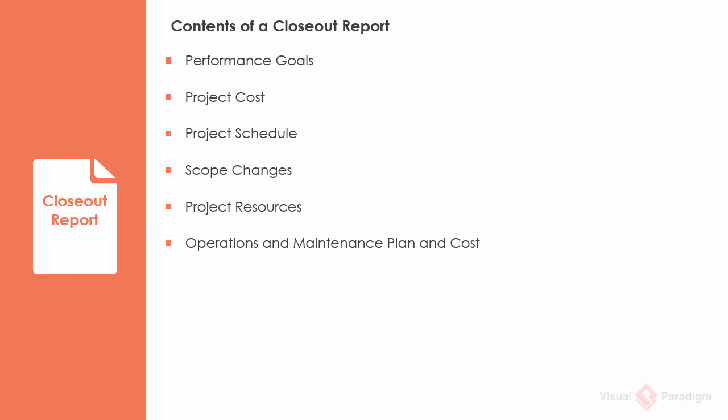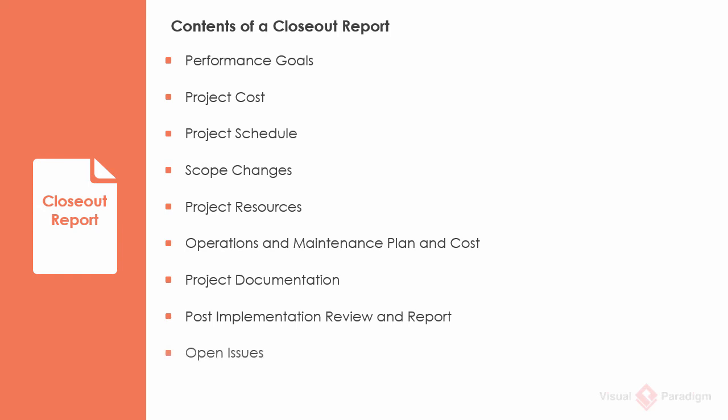Operations and maintenance plan and cost: the plan for operation and maintenance of project deliverables, stating the estimated annual cost of operations and maintenance. Project documentation: identify all project documentation materials stored in the project library or other repositories, and the type of media used and disposition of project documentation. Post-implementation review and report: identify the dates for completing post-implementation reports and the person responsible. Open issues: the open issues for resolution within the context of project closeout.